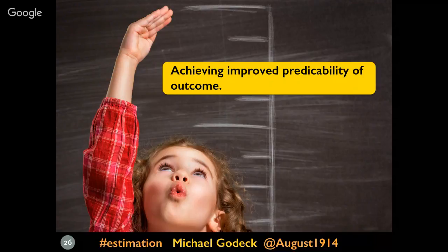As soon as you say it's going to take 2 days, and then somebody says, why aren't you done in 2 days, right? It becomes a target at that point, then it becomes counterproductive because it introduces the risk of landing on a suboptimal solution, right? Because now you're going to get it done in 2 days, even if it's not the right thing. When we look at estimate from the perspective of uncertainty reduction, the discrete estimate value doesn't do much to clarify what needs to be done.